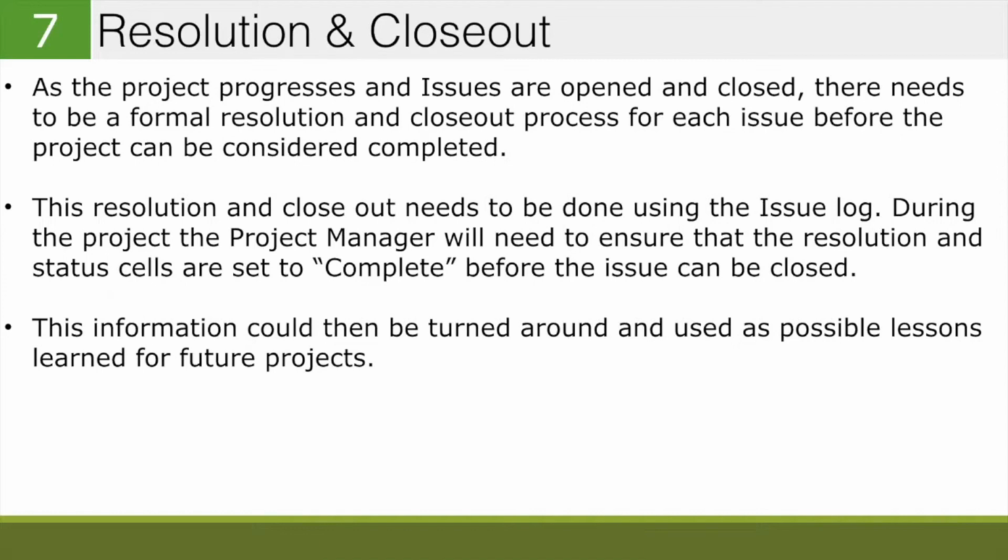You don't just want to have people randomly going in there and closing issues and opening issues. You want to really have that formal closeout process to make sure the team members and everyone's on the same page, but really understanding that there is a process to follow. And it can't be done randomly. Issues are too important. They're too often impacting projects and the execution of a project. So you really want to have some formality around how you close that out. That make sense? Yeah, so do it in a team meeting, do it in a status meeting, but don't just have people randomly closing issues. You should have it done through the project manager.